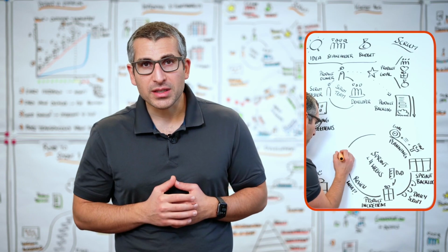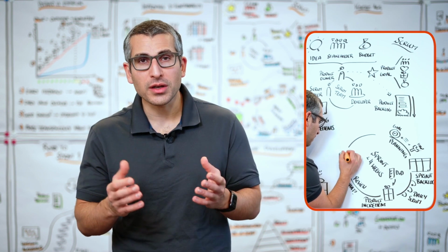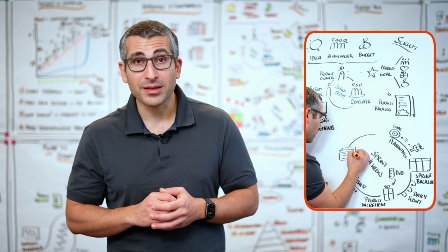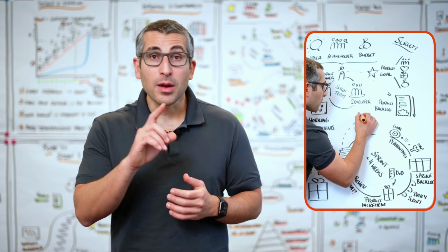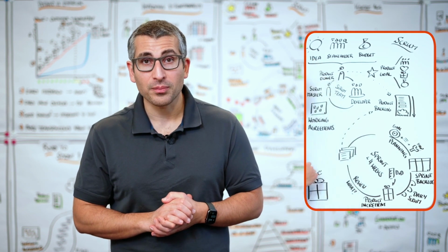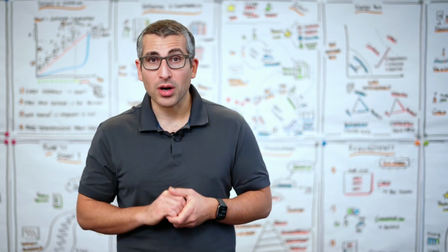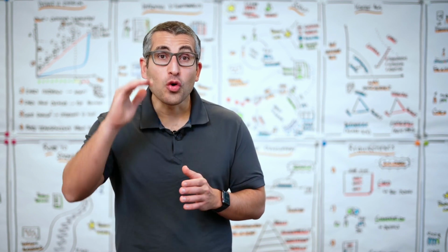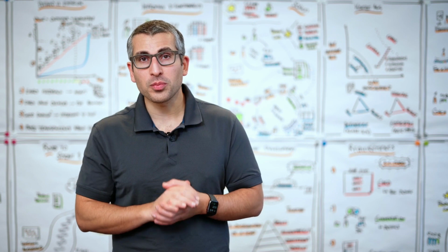The feedback we receive from our stakeholders is usually new product backlog items. And those product backlog items, as the name indicates, move into our product backlog. But it's the discretion of the product owner, it's the authority of the product owner to decide where he or she wants to prioritize them.